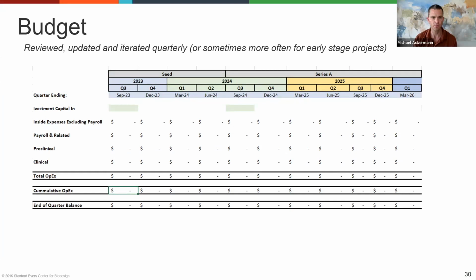So, in January, you said you would spend $100,000 and you spent 130. Why? Or actually, oftentimes what happens is you said we're going to spend 100,000, you only spend 70, and it looks like a good thing, but oftentimes that's just because you're behind. So it's actually not a good thing.